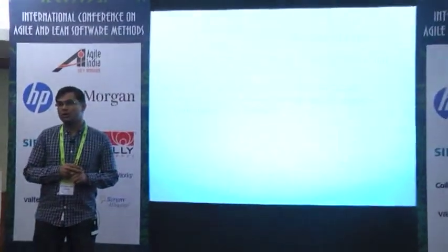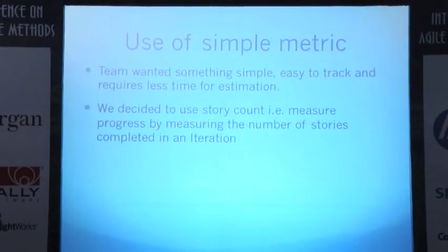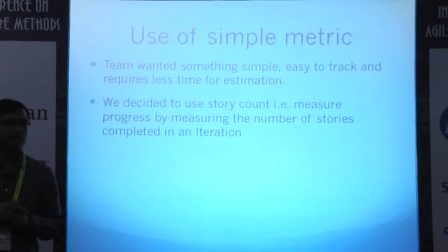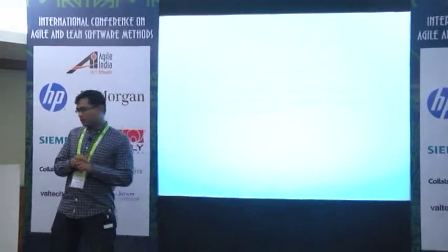So what did we do? We were asked to build a mobile application for an insurance company so that users can buy car insurance on mobile. The product owner was very keen to understand how much time and effort it would take to build this MVP scope. We decided not to use story points for estimation. But then what to do? How can we predict how many iterations it will take to complete this? We wanted something simple, something that can help us track easily and require less time in estimation. So we went ahead and started using story count — measuring progress by the number of stories completed in an iteration rather than story points completed.